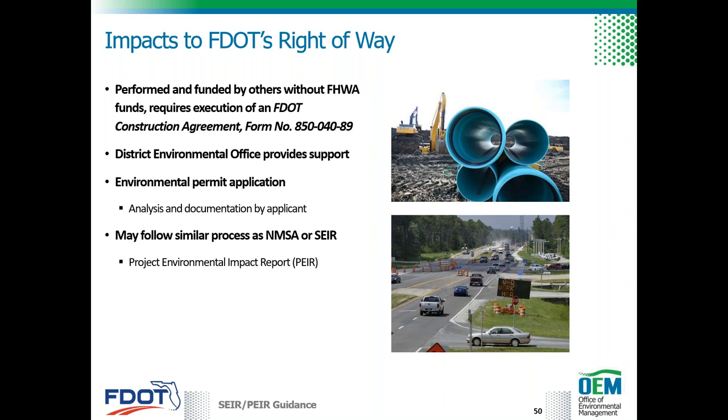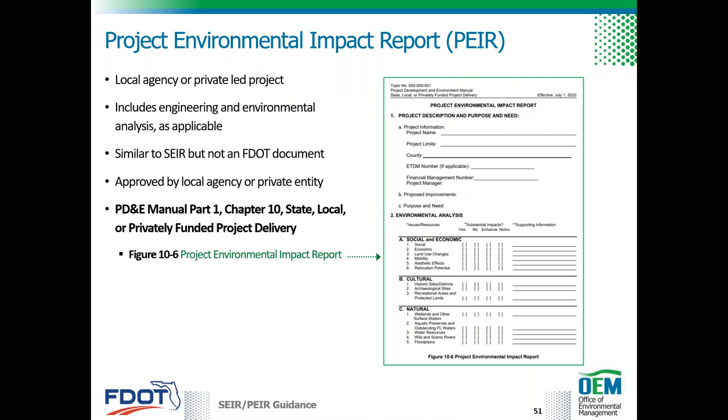The supporting environmental documentation for local and privately funded projects constructed on FDOT right-of-way — necessary to acquire environmental permits and an FDOT construction agreement — may end up being a Project Environmental Impact Report or PEER. The local agency or private entity-led projects might be documented in a PEER. The PEER includes both environmental and engineering analysis and includes similar information and topics to the SEER, but it's not prepared in SWEPT, so the format is a little different. The outline of a PEER is available in Part 1, Chapter 10 of the PD&E manual.